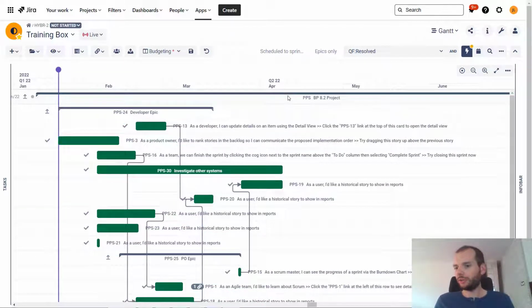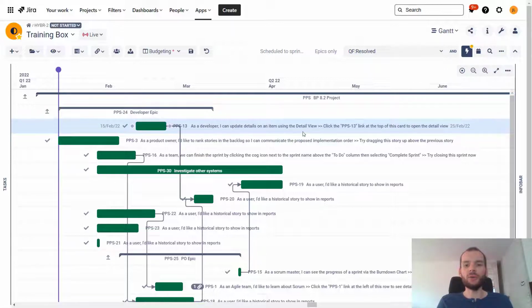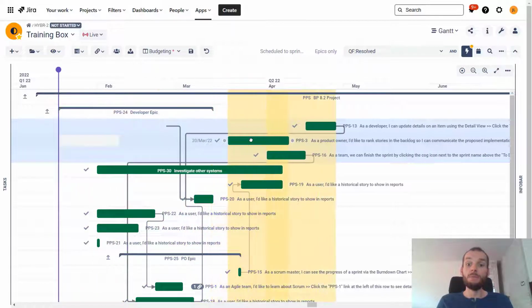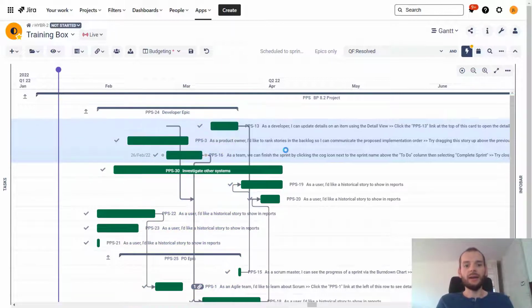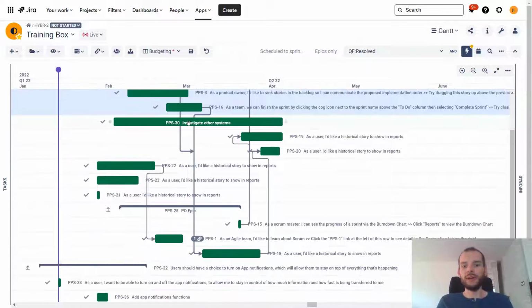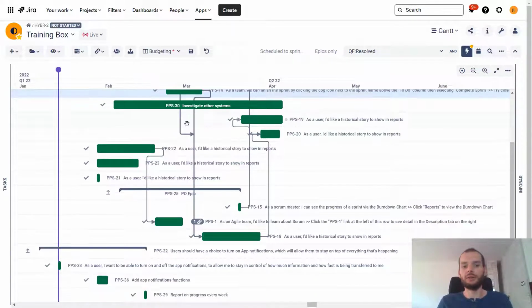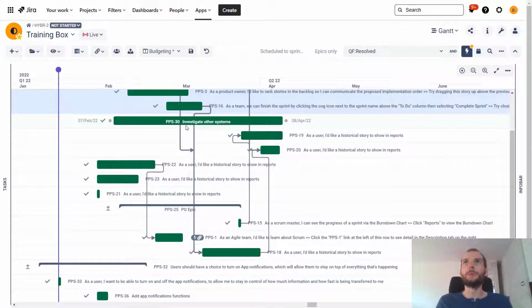So, having covered the biggest, in my view, change that BigPicture 8.6 offers, let's have a look at several smaller changes, but still very useful in my view. Looking at Gantt module, we can edit the dates of multiple tasks at the same time. If we select multiple tasks, you can see that I can move them all on the timeline at the same time. So yeah, if we want to move multiple tasks that are not linked by dependencies or anything like that, this is the way to go.